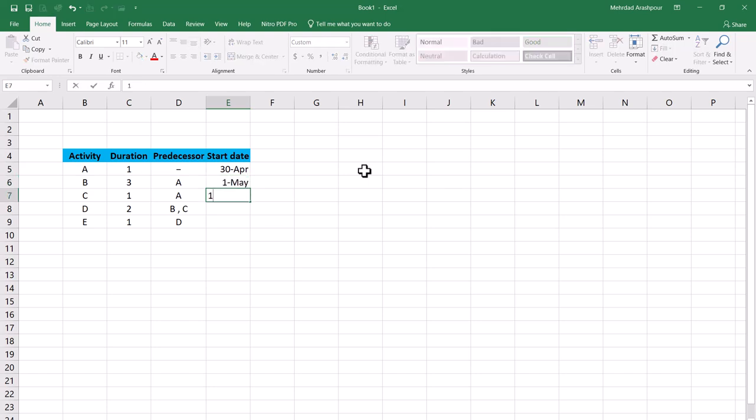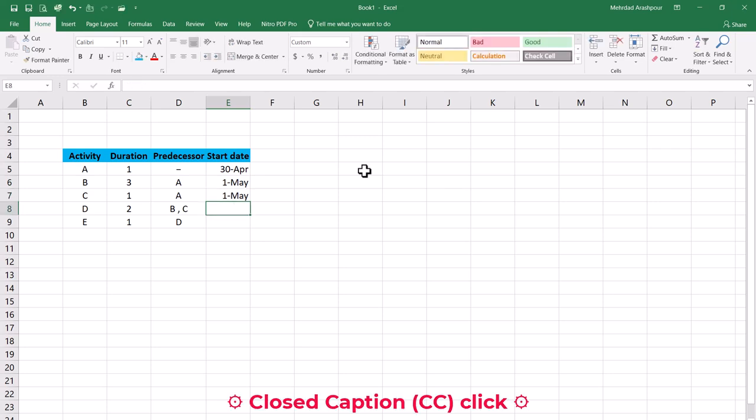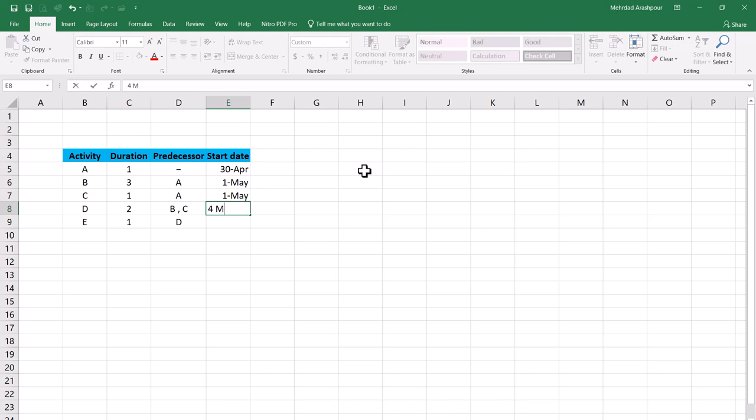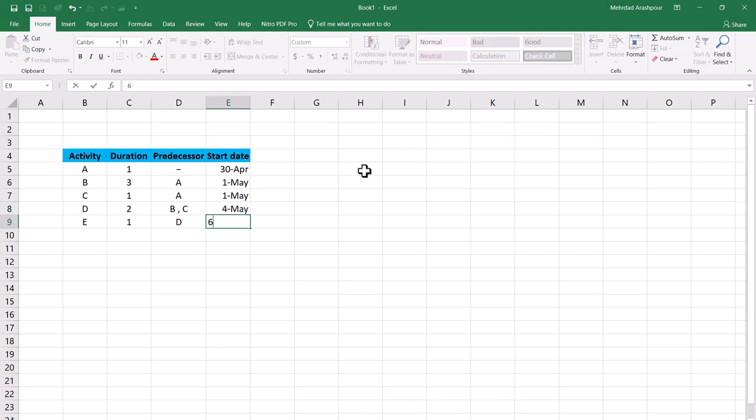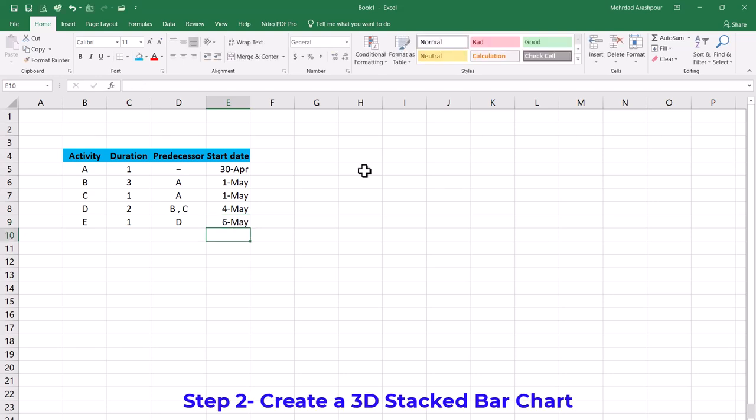The same condition applies to activity C. The next activity has two predecessors B and C. The start date for activity D will be the latest finish date for the two which is 4th of May. Finally, activity E will be starting on 6th of May. This concludes the first step in creating our project Gantt chart in Excel.